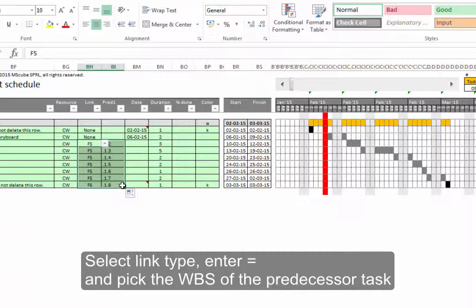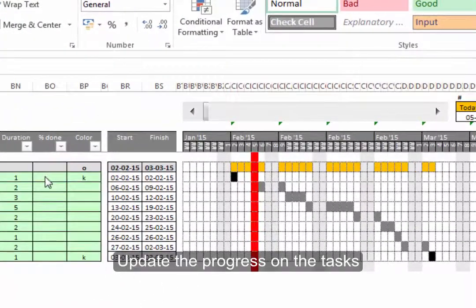Once you have entered the number of workdays and the start dates or links, the end dates are calculated automatically, and Magic-Gantt tells you exactly when your tasks and your project will be done. Once your project has started, you can track the progress on the tasks by updating the Percent Complete column in the task rows. In the Gantt view, the Gantt bars will show light blue for the complete portion of your tasks. By contrast, the incomplete portion will be highlighted in light grey.